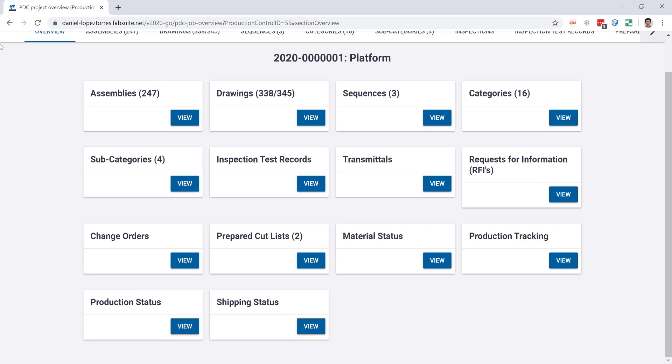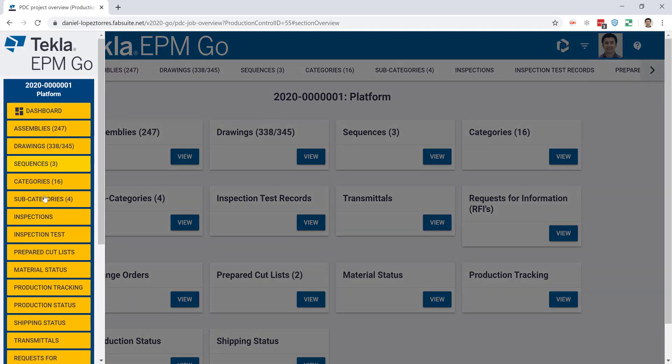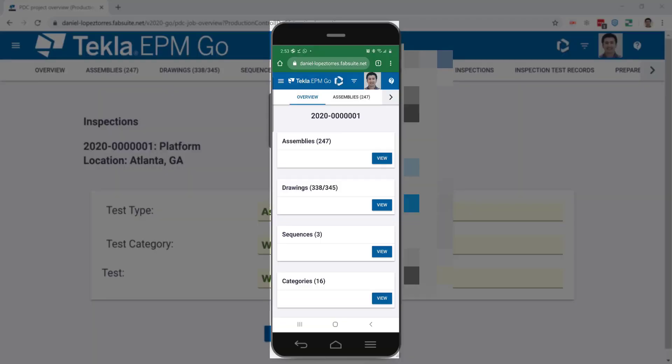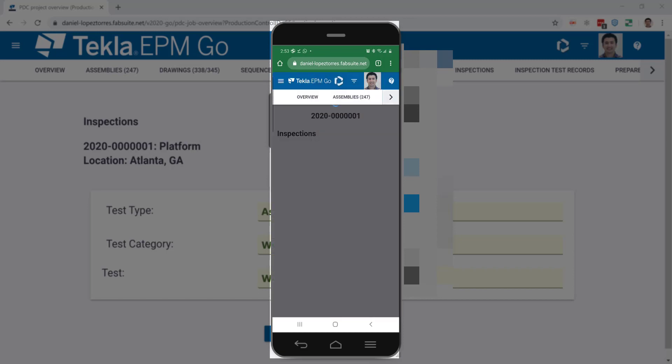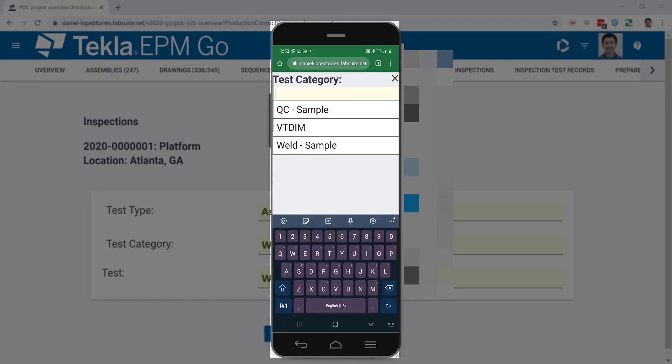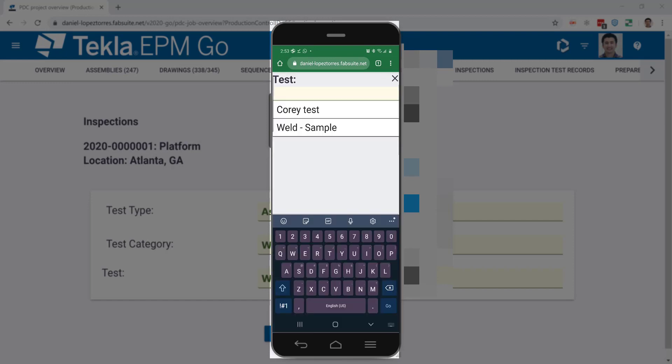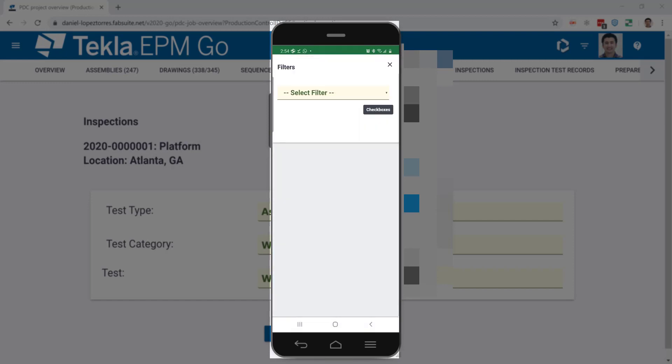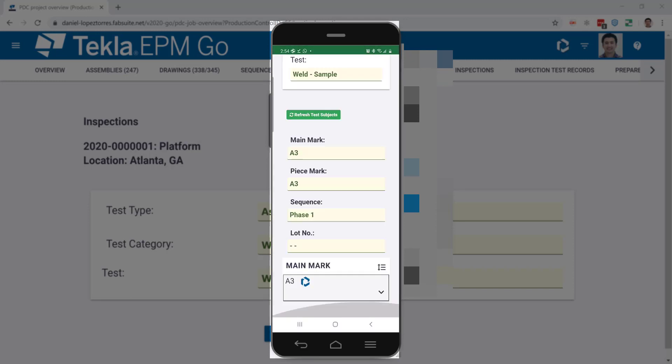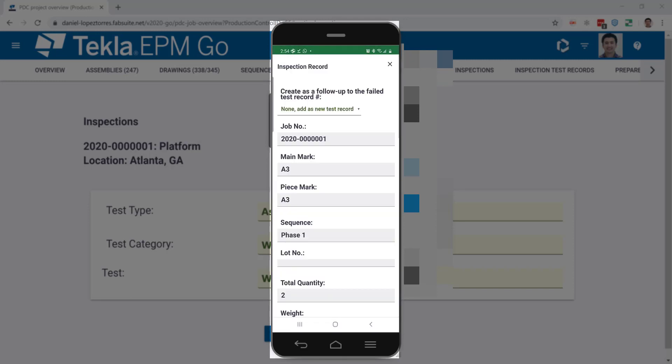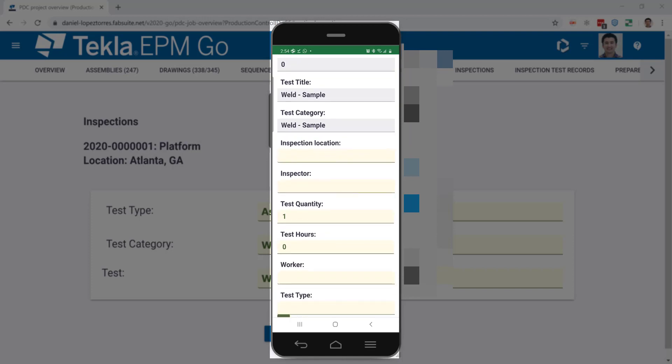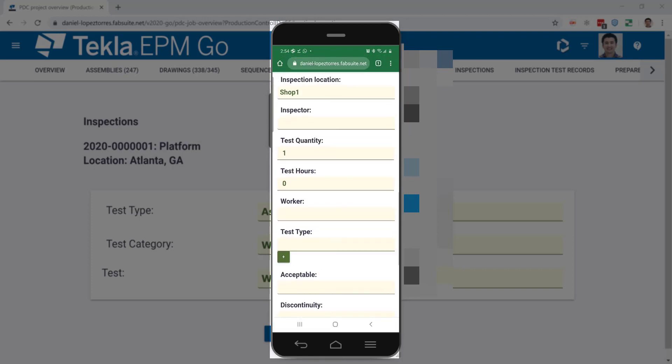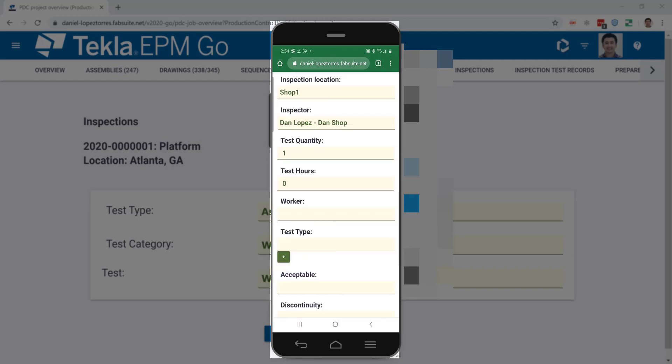Okay, so now it's the turn for inspections. This is a very powerful tool and we will develop content for tips and tricks videos about this in particular. But for now it's worth to comment that EPM Go is very helpful for inspections because, just as we saw with the welding machine maintenance records inspection, you can digitalize your inspections and even keep a picture as a backup of the piece itself. The inspections can save you a lot of time just because they're electronic records, and you could put together a quality dossier like in seconds, super fast, in any job.